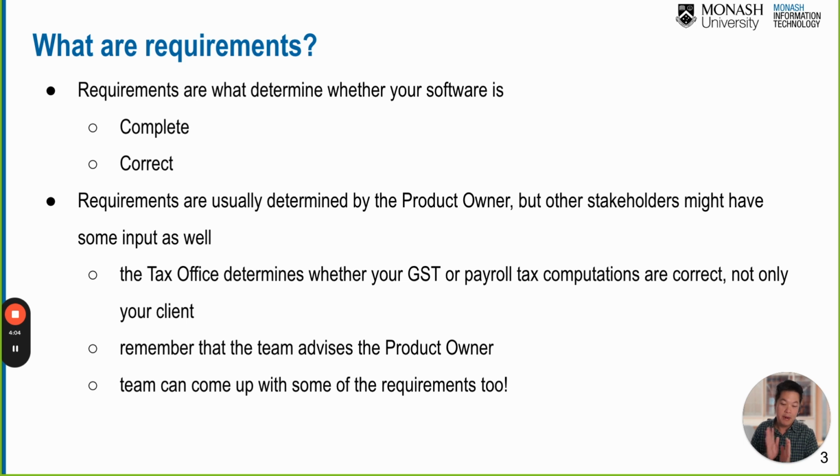Okay, but at the end of the day, we come to prioritization. We actually have talked about that using the MoSCoW principles, right? But at the end of the day, the requirements should be prioritized based on the value from the customer's point of view, not from the developer's point of view. What I mean is, let's say the dev team said, oh yeah, I think we should develop the login feature first, but the customer said, no, we need a tax calculator application as soon as possible. So the tax calculator application should be the first priority rather than the login feature. You know what I mean? Yeah. So customer comes first.